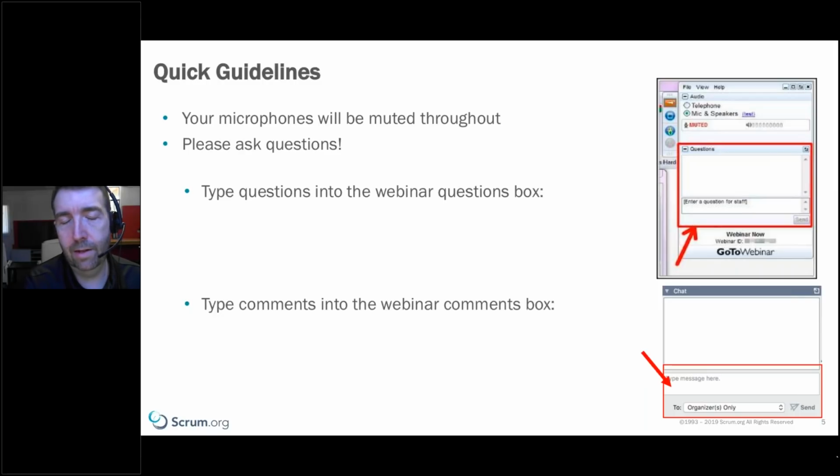Well, then in that case, what I'll add is that if you have an effective sprint review, then you're going to be looking at the probable content of the next sprint, and you're going to be getting feedback on the increment that was just made done. And so both of those activities are useful things because, for instance, if you had very happy customers in a sprint review, then that's great. If you had very unhappy customers in a sprint review, then that's something that you want to discuss in a retrospective. And if you just had the retrospective and didn't discuss that because you didn't know your stakeholders were unhappy, then there's a change opportunity that you've missed, because you've probably not been working on the right thing during the retrospective if you had it before the review.